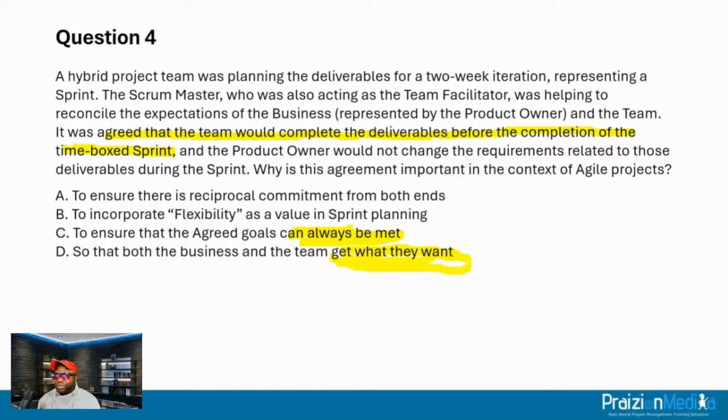And it says the product owner would not change the requirements. So in some way, you're not really being as flexible anymore in this context. You're locking it down so that once we're airborne and the sprint is on its way, you're not going to have crazy, needless change. That is not to say that change cannot happen in a sprint, but as much as possible, we try to discourage needless changes. And that's our commitment to work within the sprint to get those features, requests, stories, whatever they are, done.